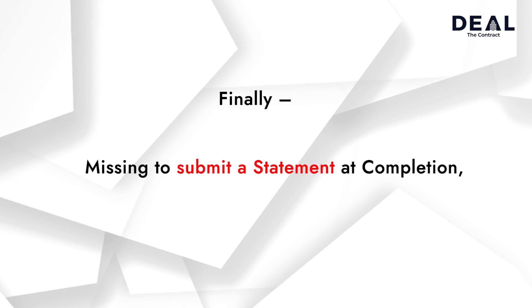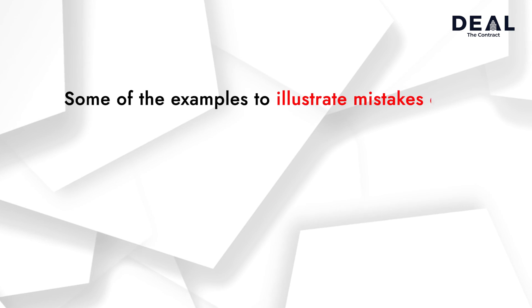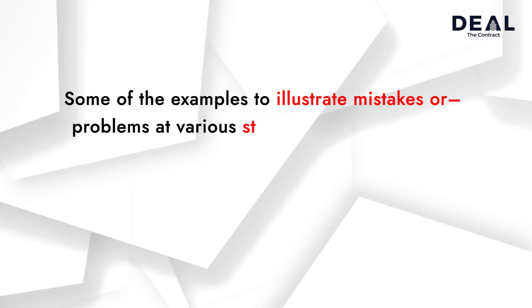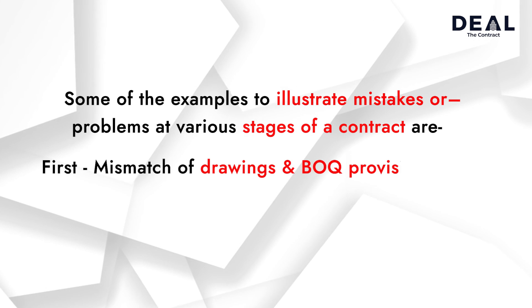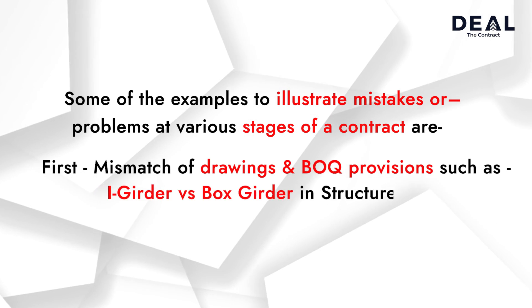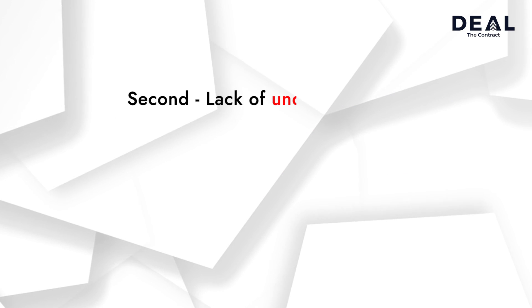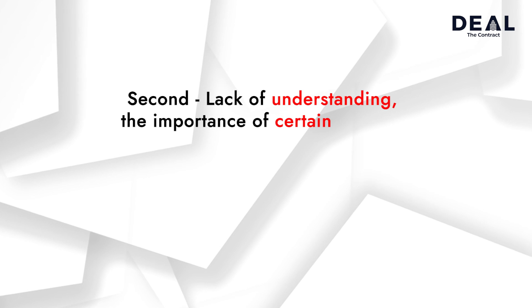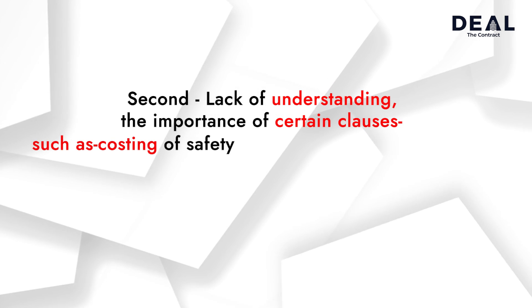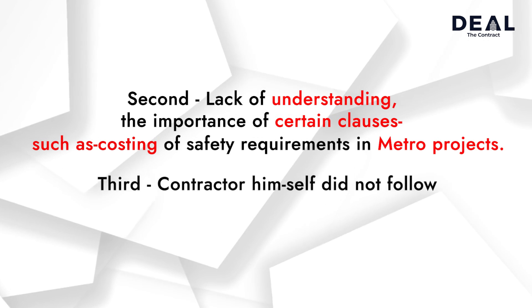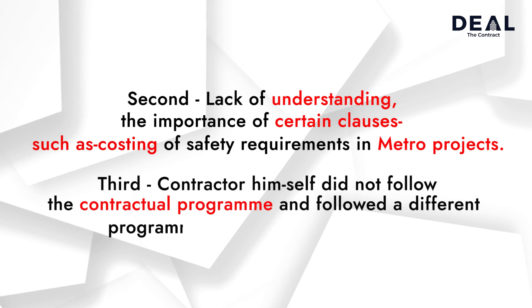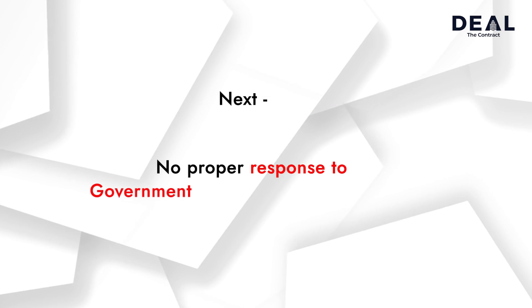Finally, missing to submit a statement at completion, which is normally called the final bill. Some examples illustrating mistakes at various stages of a contract are: 1) mismatch of drawings and BOQ provisions, such as high girders vs. box girders in structures; 2) lack of understanding the importance of certain clauses, such as costing of safety requirements in metro projects; 3) the contractor himself did not follow the contractual program and followed a different program, which creates problems; 4) no proper response to government authorities' correspondence.